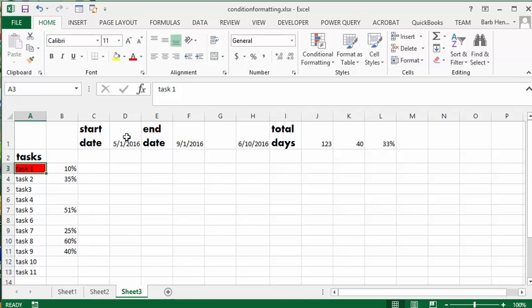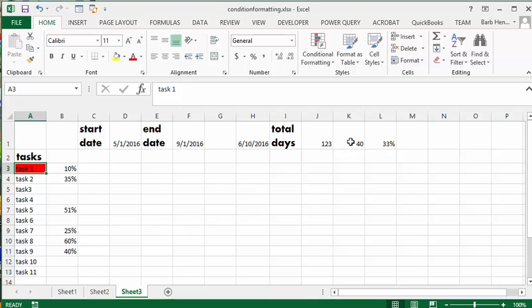The project starts on the first of May and ends on the first of September. The total number of days is 123. The total number of days that we have gone so far is 40.